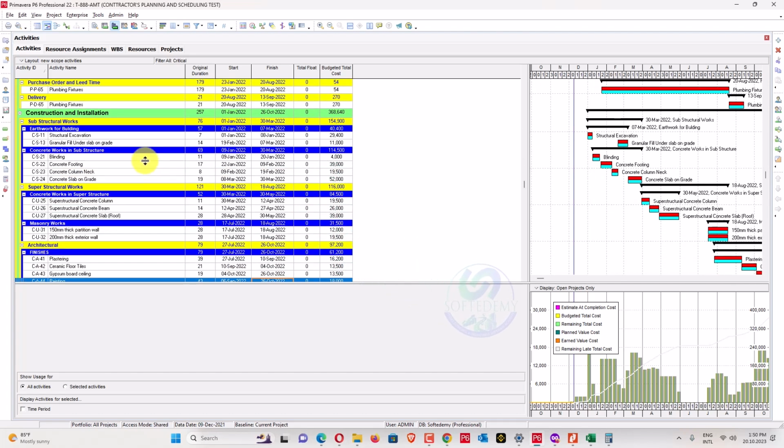While monitoring a project, if you have zero float and the maximum number of activities which are more critical, it will create a meaningful critical path. If some activities are open-ended and their float is maximum, you will not notice until they delay. The time will just pass and you cannot recover it. So the critical path should be accurate and meaningful to the project, and it should be decided at the baseline stage.